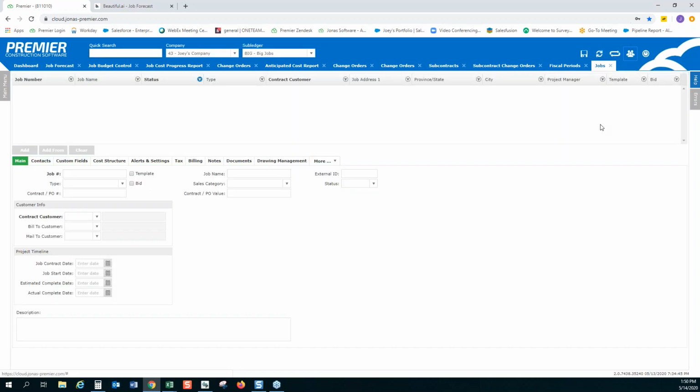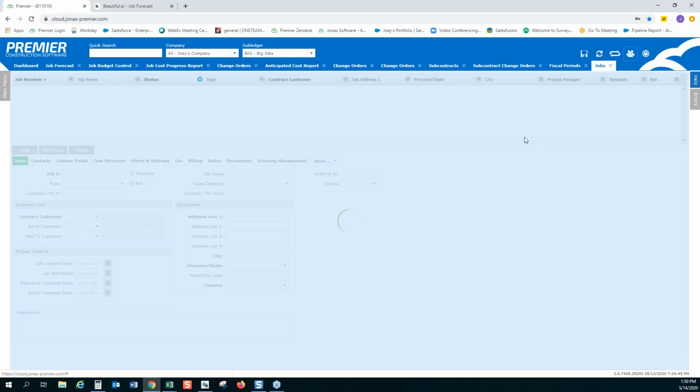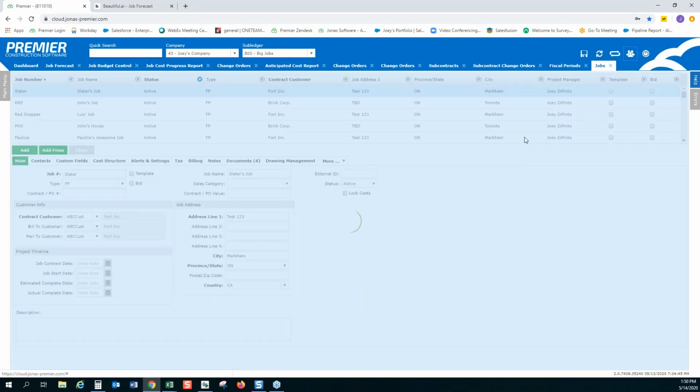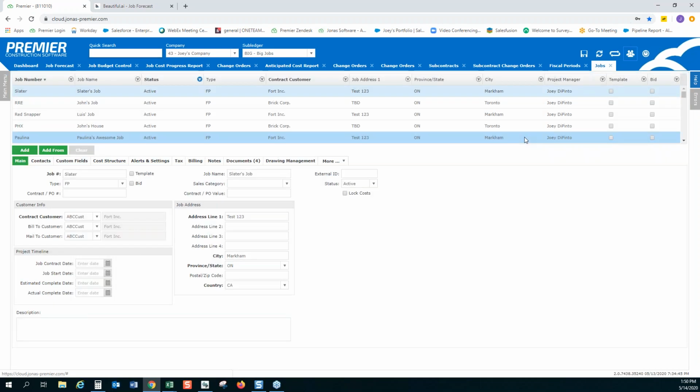I know that if you lock the jobs on the job screen itself, it will prevent any commitments or actual costs getting posted to the job. But if it's something that you're looking to just do monthly, you would have to be cognizant that you have to go back in and unlock it at the start of the new month. Yeah, exactly. That's a fantastic point there.